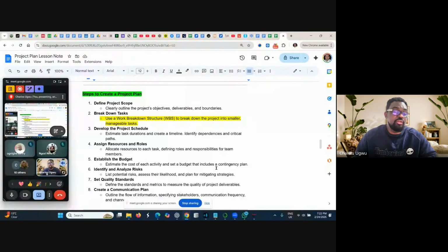It is extremely important, meaning that, for instance, if they give you £10,000 to implement a CRM system, you don't just go and start spending the £10,000. You should start by using £7,000. Then keep 3,000 as contingency. If anything happens, you have something to fall back on.